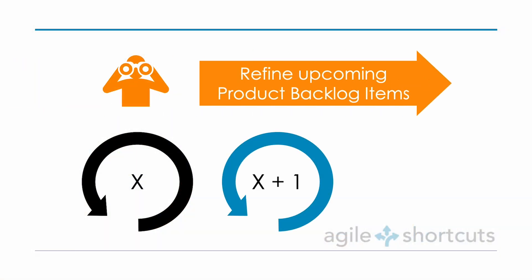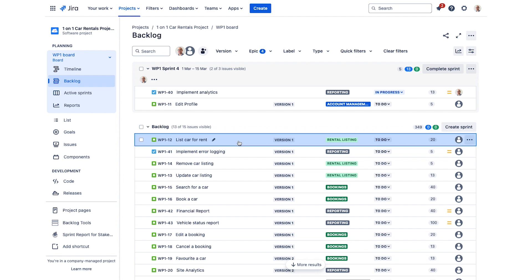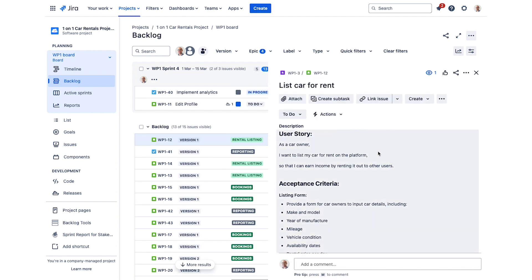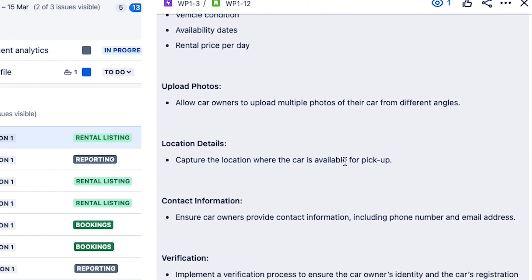At these sessions the product owner should be taking the team through the upcoming high-priority product backlog items — those the team might be working on in the next sprint or the sprint after that. In Jira, the product owner and the team will be looking at the product backlog view; the product owner will start from the top, click on those items, and take the team through the details — clarifying what needs to be done and helping the team better understand the customer's needs and requirements.